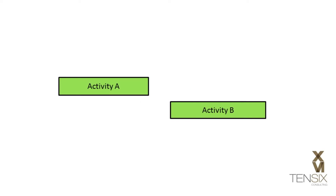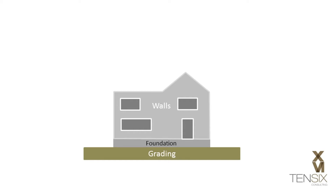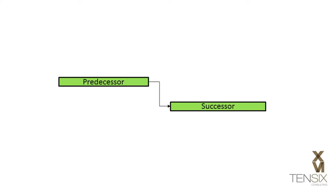In P6, a relationship refers to a link between two activities. This link describes the logical flow of work between tasks. For example, in building a house, the roofing cannot start until the walls are finished. P6 uses the terms predecessor and successor to describe the relationship between two activities.